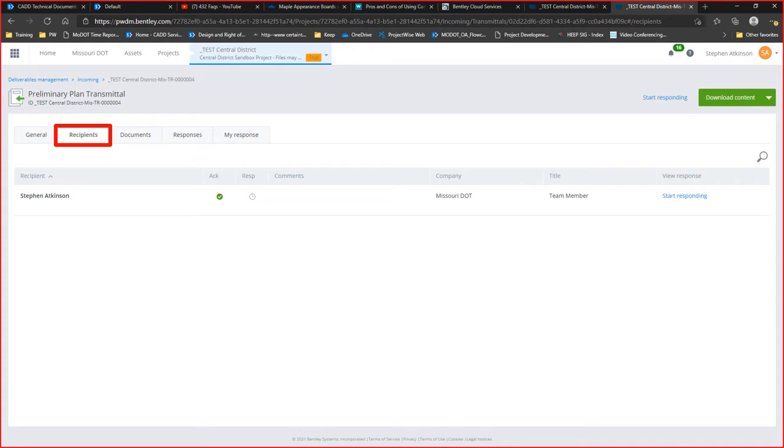The package could be sent to one or more recipients at multiple organizations for review or for information. Some recipients can receive submittals and not be required to acknowledge or respond, so it's very flexible. Typically, a package should be sent to one individual per organization because that person will be charged with consolidating and providing a response for the organization or be responsible for delegating that responsibility. These are some best practices, but may not fit all situations.